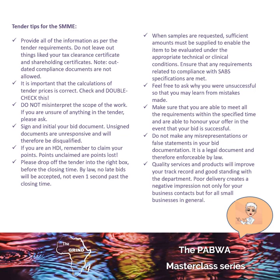Please drop off the tender in the right box. Some organizations sit in one place — for example, they could sit in Pretoria but their tender box is in Bedfordview. You need to be aware. Don't assume that because you know where the offices are, the tender box sits in the office. I've had a few clients make this mistake where they know where the client is, and then on the day the driver realizes the box is in another place. Please make sure you get that right, otherwise you will be late and your tender will not be accepted.